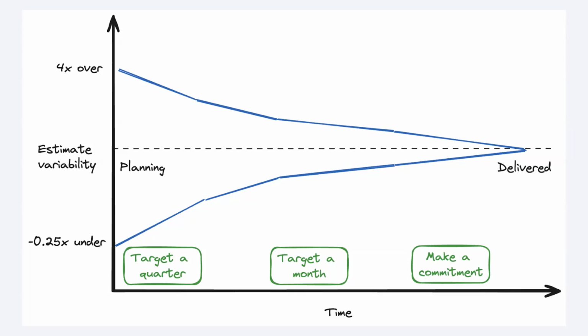And this is not easy to get a team around to this way of thinking, right? Particularly the businessy end of the business, the front end of the business, accepting that there's a difference between targets and commitments. I'm not suggesting this is a magic bullet, a silver bullet, but without doing it, it is very, very hard to have sensible planning conversations. So if the business can understand about this variability of estimates up front, and the engineering team can understand that what they're making is not a promise based on a solid estimate, but a target that they're shooting for, then things actually start to get a little bit more sensible. So when you're making estimates out at this sort of level, they really need to be on a planning horizon that is not a particular date and time, right?